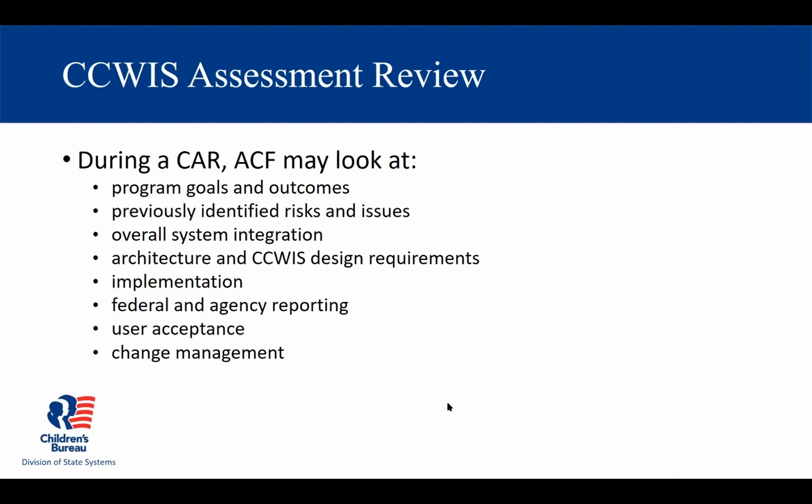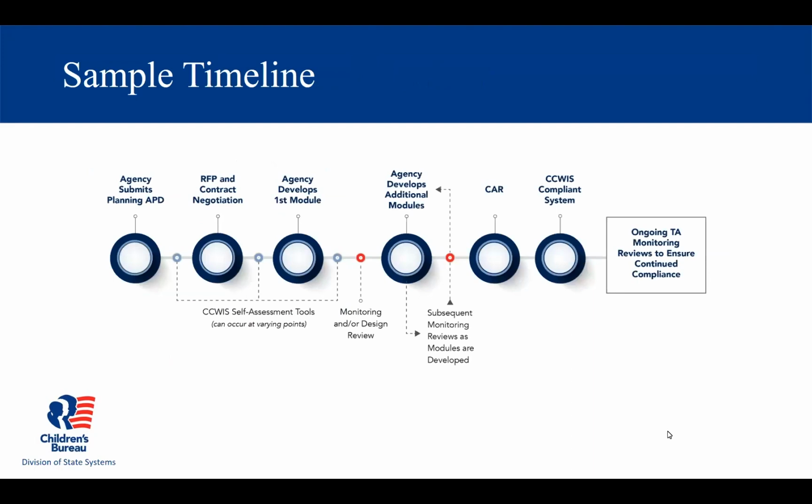So I have one more slide and then we'll take some questions. Next slide, please. Thank you. This is just a sample timeline. It's meant to visually represent what Teresa and I have been talking about. If you start on the left side, we anticipate that once an agency submits a planning APD, they can start using those self-assessment tools, even before, frankly, all the way through RFP and contract negotiations and developing the first module.